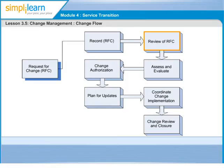The RFCs are assessed. This may require involvement of the Change Advisory Board or Emergency Change Advisory Board for business justification, impact, costs, benefits, and risks of changes.